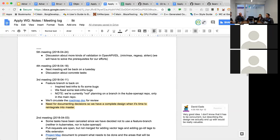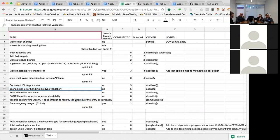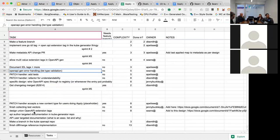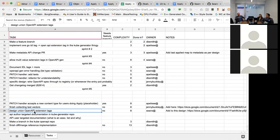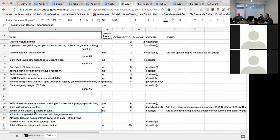All right. Do we have what's on the next sprint? Or did we pull anything into that next sprint? That's like one task. We have... You have one... If you wanted to take another one, I would drag in the union. Well, what about the map? I think the map is going to be this map. So there's map, struct, union. I mean... Honestly, I'm more worried. I would rather do the hard one first. Does that make sense? Yeah. I don't know if it does. There's more risk. Yes. There's more risk if the longer we delay the union. So it depends what direction we want to take. Do we want to do a small incremental? Or do we want to... See, because we don't need a union to get something working. We probably need maps.